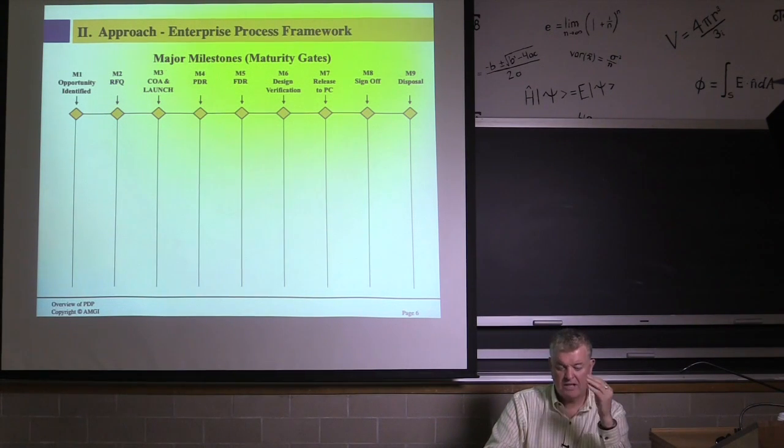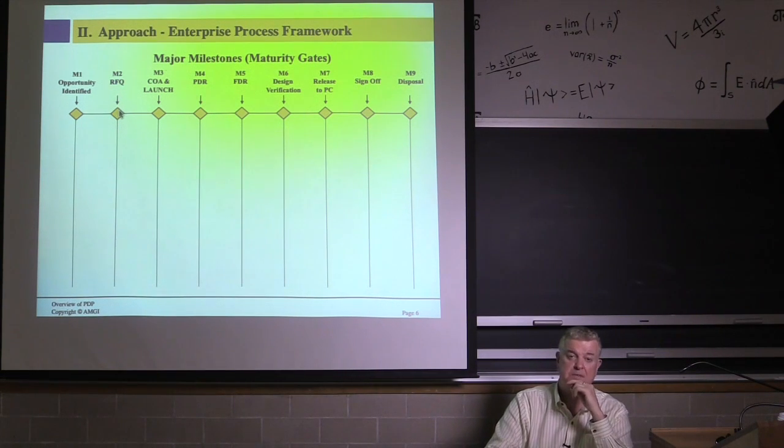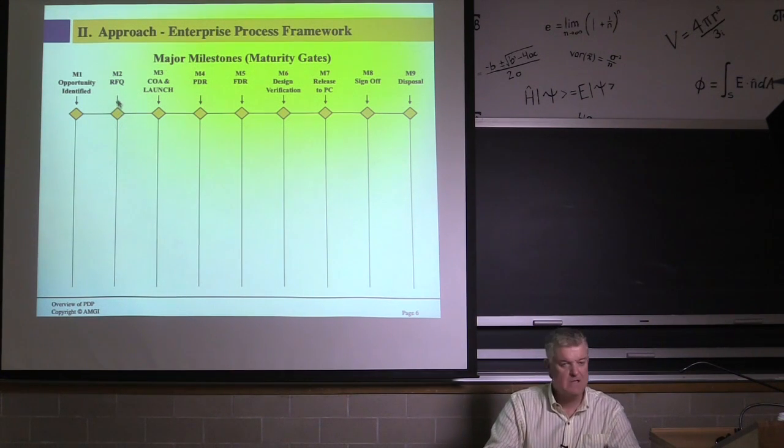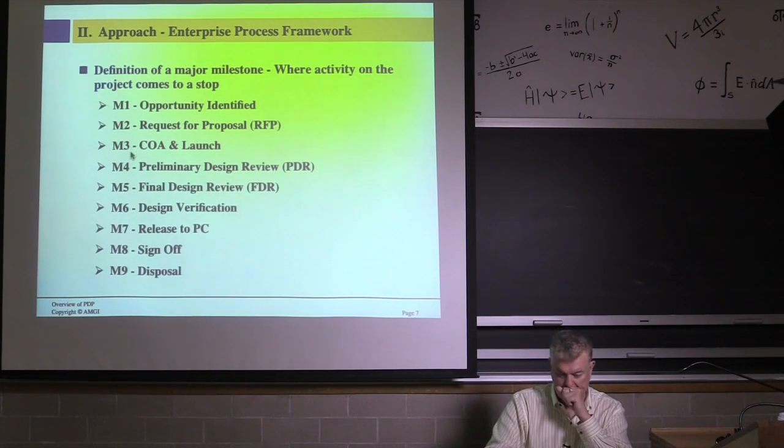You've assessed the project, the salespeople have brought it in, but maybe you as the engineering vice president, or the manufacturing or operations vice president, or the CEO say, hey look, there are too many risks with this. Could be a company where there's chaos, or a country where there's all kinds of chaos. You might actually say, no, the risk is just too great, so you kill the project here. So at each of these milestones, decisions are made.